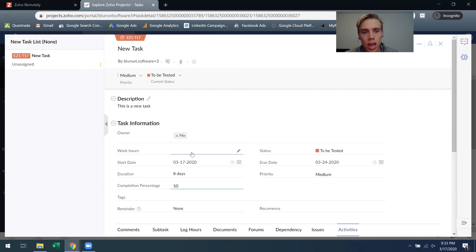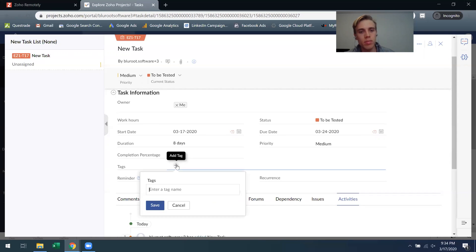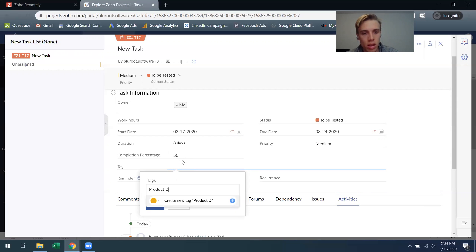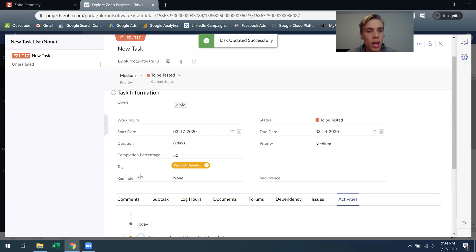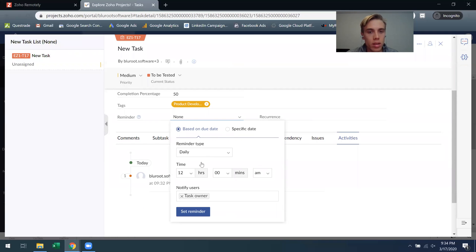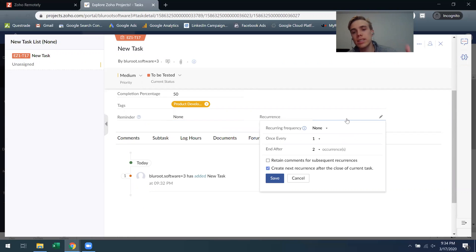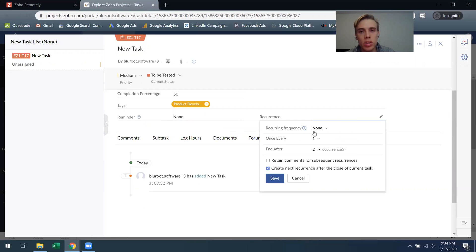You can create quick tags for yourself saying this is something related to maybe product development. This is a quick way to classify different types of tasks that you have. And then any kind of reminders, so as the due date approaches do I want to be reminded. Or do I want this task to come up many times, so for example if it's something that you have to do, a service you provide on a monthly basis, you'll want this task to recur.